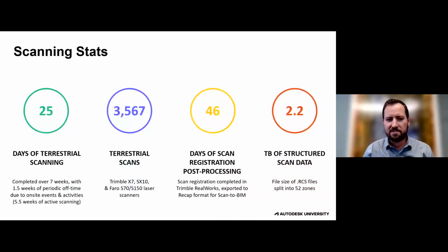Overall scanning stats, here's a look at the numbers. So all in all, it was 25 days of the terrestrial scanning on site, completed over 7 weeks time. We did have a total of about a week and a half of downtime. The NFL draft took place while we were scanning there, and there were rooms and entire days where we could not access. There were also other events. There were concerts and other events happening that we needed to log as off days and could not access the facility to scan. But over the course of 7 weeks, we ultimately completed 25 days of scanning out there.